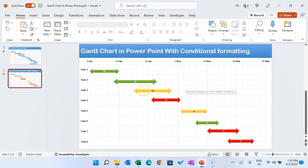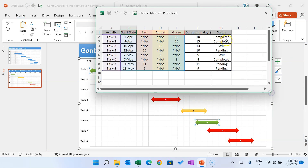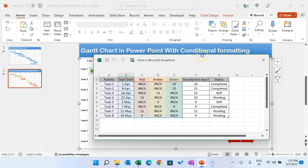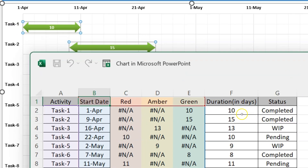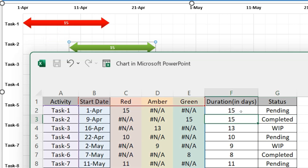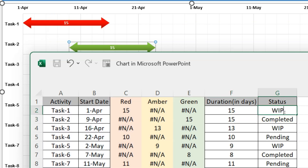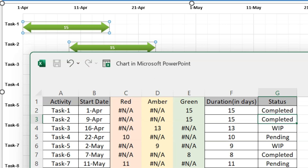In the second chart, where we have used conditional formatting, you can just right-click, Edit Data, and change the status, start date, or duration. For example, if Task 1 is completed but I mark it as pending, you can see it changes to red color. If I change the duration from 10 to 15, the bar size changes. Marking it as WIP shows yellow color, and completed shows green color.